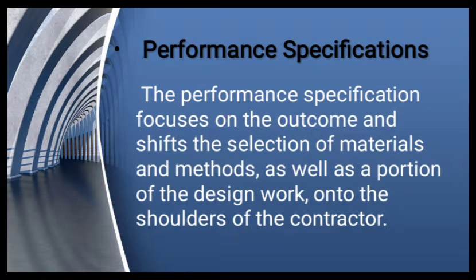So in this type of spec naman, the architect or engineer describes what they need or what needs to be done. And then it's all up to the contractor how they are going to do it. They are not instructed as to how to accomplish the task of meeting the performance specification requirements, but only as to how the component must function after the installation.